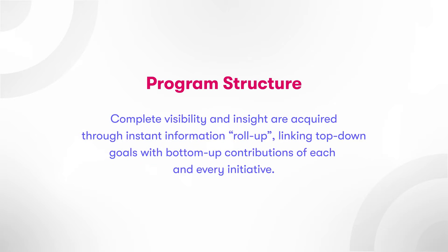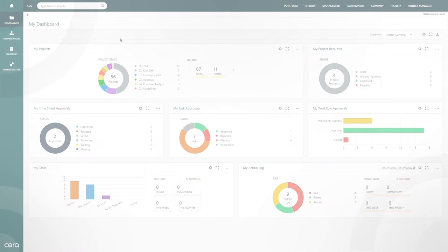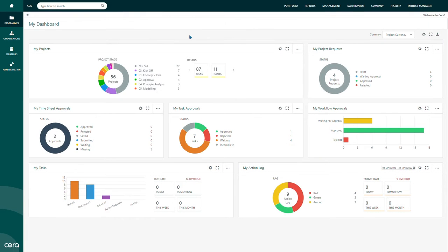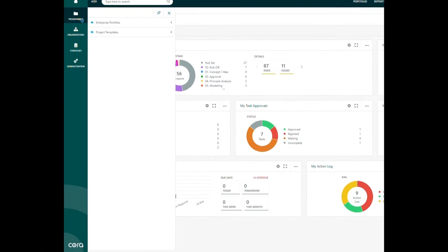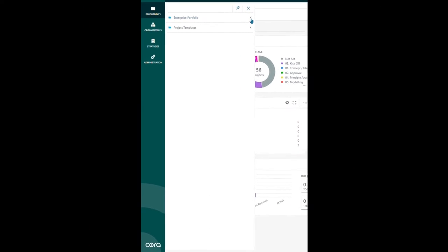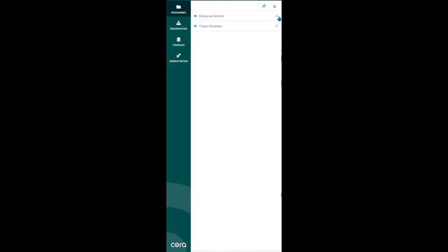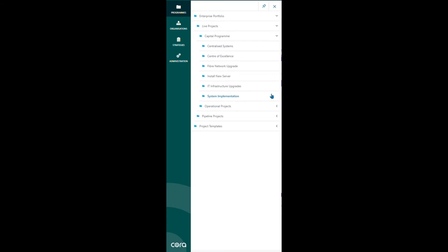Program structure. Using a tiered program structure, users can create and navigate to a hierarchy of portfolio, programs, and projects. Each tier aggregates the information below. This allows for concise communication from the project manager all the way to senior leadership.